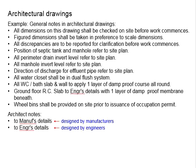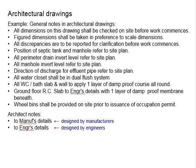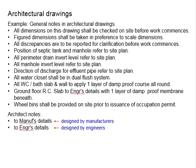Within the architectural drawing you will also see notes such as 'to manufacturer's details' or 'to engineer's details.' These refer to specific parts of the building. 'To manufacturer's details' means the element will be designed and provided by the manufacturer — this is normally related to roof structures, escalators, lifts, and so on. 'To engineer's details' means it is the responsibility of the engineer to design that specific element, and is normally related to structural elements.